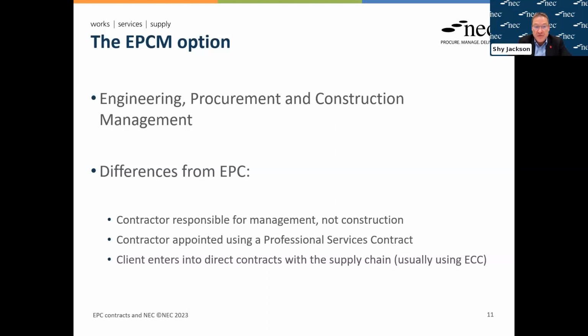And as you can see, this is very, very different from what Peter described as the client telling the contractor, I want to come in 2 years' time, get the key, and be able to switch on the plant. If you look at NEC, that's the sort of situation where you can use X12, which is multi-party collaboration, and a slightly different variation is using option F management contracting.